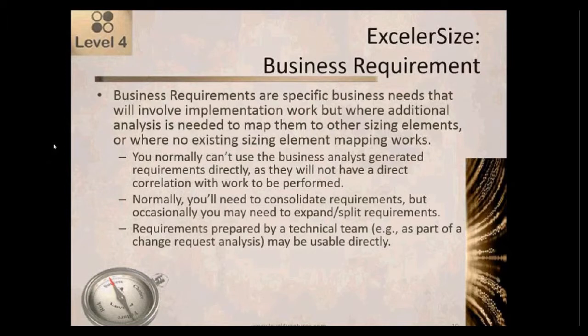They were just very broad in their definition of what the requirement was. On the other hand, if you have business requirements that are prepared either by the technical team or with consultation from the technical team, you may be able to use those directly. It's not uncommon to take the technical requirements and just count them up. Depending on what level they're written to, they may be usable as an approximation of the effort required by identifying how many business requirements there are.